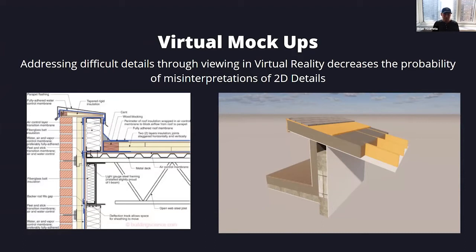So I highly recommend this for constructability reviews. Obviously, in most scenarios you still need the real mock-up of a curtain wall system so you can tell quality. But there are a lot of things you can do preventatively ahead of time, virtually, before you even order the actual mock-up.